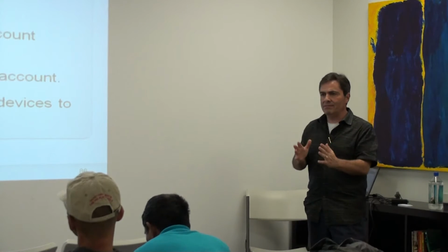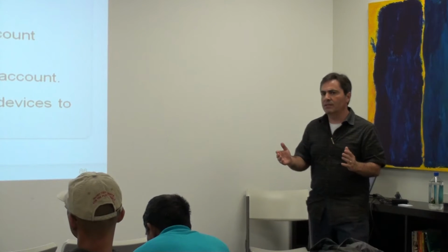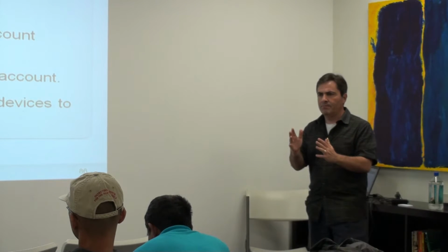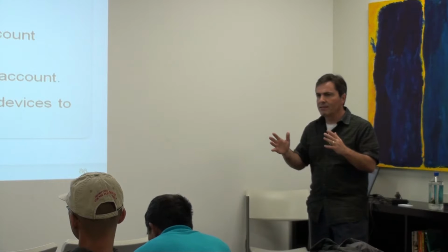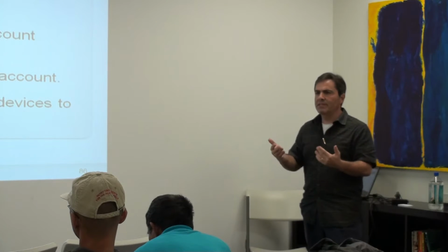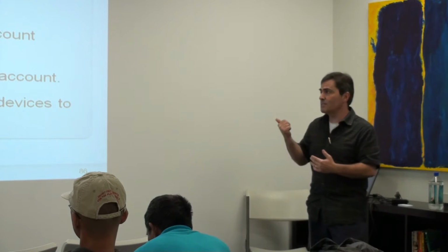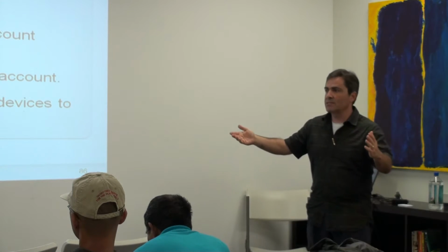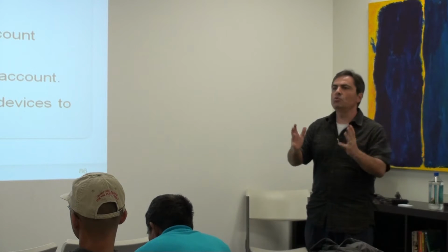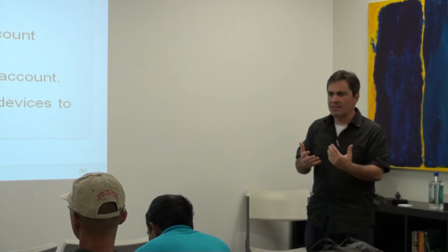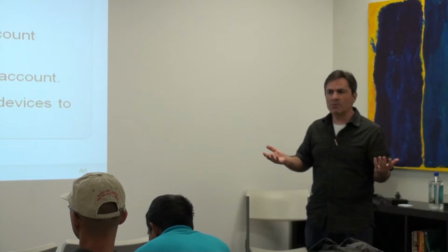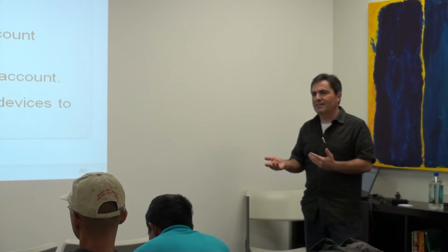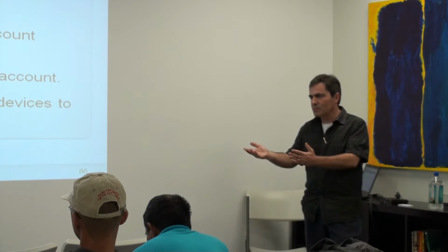The goal is to get it small enough that you can do design, build, and test in between 3 to 5 days. If it gets any bigger than that, that's what leads to a lot of issues with Agile teams. I can tell you, on a practical level, this is probably the biggest problem that Agile teams have: they take on too big of a user story, and then they get stuck, and then their QA people are sitting, waiting for code to come in to test, and before you know it, it's the end of the sprint.